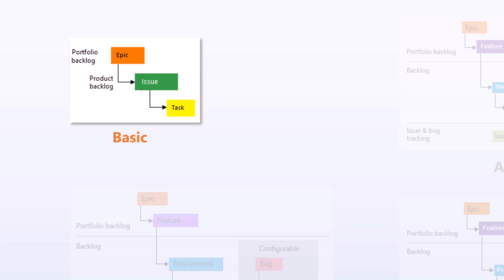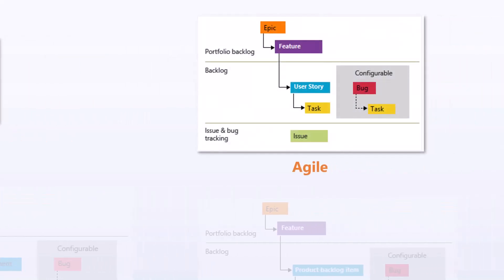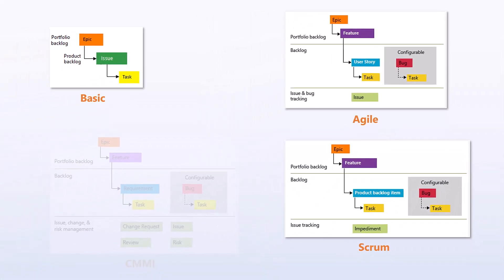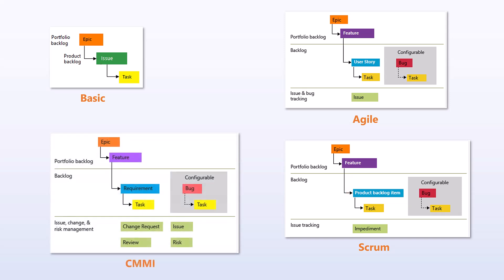Those four processes have specific work item types. The Basic process has epics, issues, and tasks. Agile has epics, features, user stories, tasks, and bugs — and bugs can have tasks as well. Scrum is pretty similar, except there's a difference in terminology: instead of user story, it uses product backlog items. CMMI is also very similar to Agile and Scrum, except user stories are called requirements instead of product backlog items. So except for Basic, the last three processes are pretty similar in how they organize their work item types.